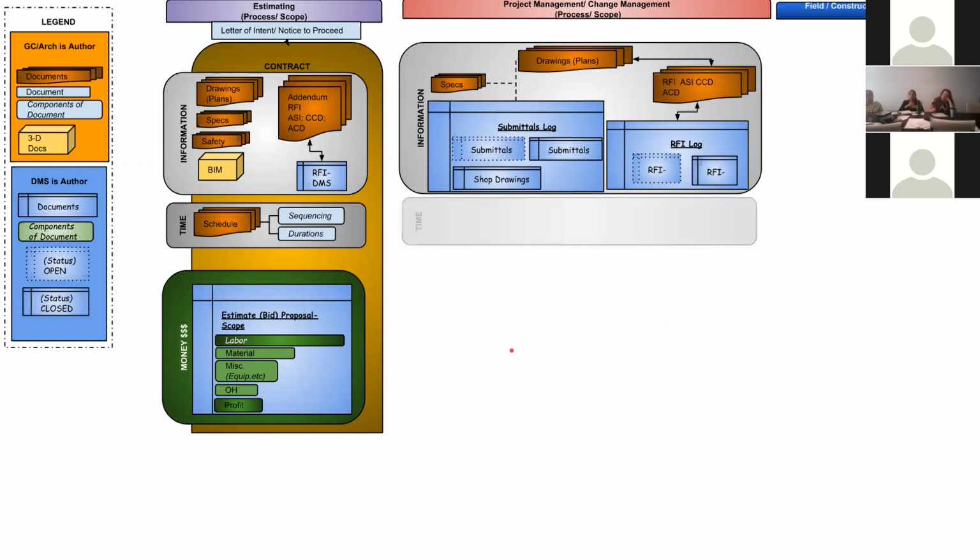So now let's jump into the time aspect of project management. Once we have a contract and we have a master schedule, they will provide a different schedule, a more granular, broken down point of view. I've seen schedules to be thousands of pages long. So on the master schedule, they'll do a big overview of the project, and then as they're moving through the project, they will break the schedule down into more granular levels so that everybody can see their sequencing and different pieces.